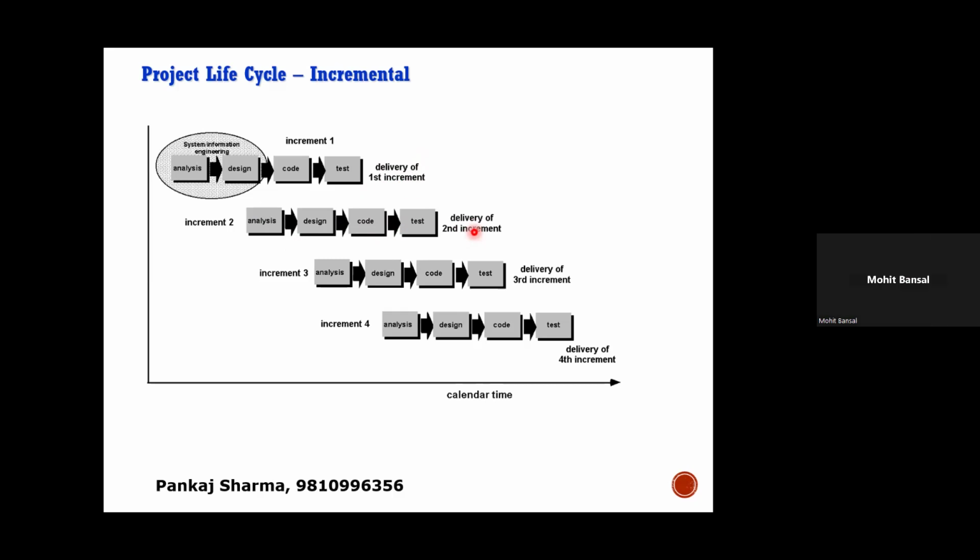Now, when you deliver a project in phases like this, after every increment, or at the end of every phase, you will also do a viability check. At the end of every phase, you will have a phase exit or stage exit, or a kill point. This is where you check the ongoing viability of the project.